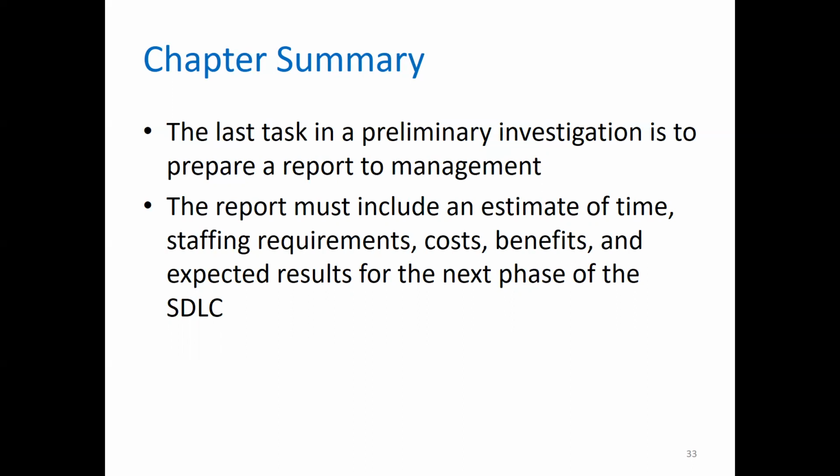Then fact-finding must be performed. After that, analyze project usability, cost, benefits, and schedule data. Moreover, evaluate feasibility, and finally, present the results to the management, giving a verdict of whether to continue or not to continue with the proposed project.